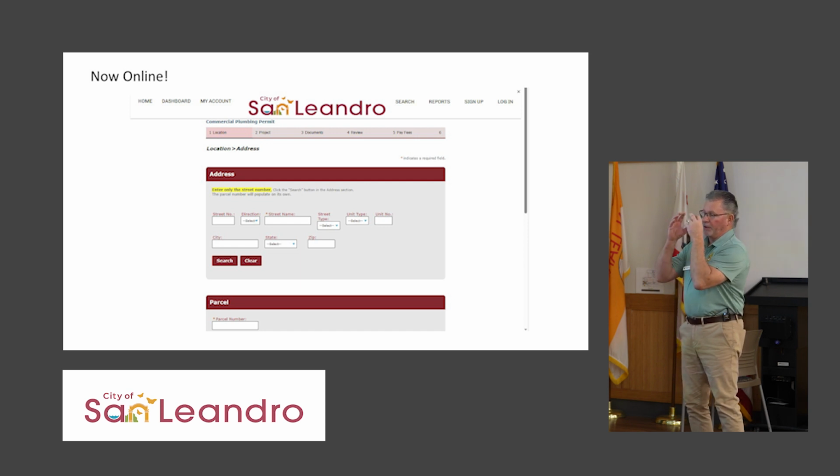We are also central dispatch. We get that submittal, and we look at it, review it. If we have to send it to planning, engineering, transportation, let's say environmental, maybe the fire department, it all goes right out of here to them. Then you put yourself as the primary, and as soon as it gets sent out, you get pinged, it tells you where it's at. And you can look on here to see where it's at in the process. That's typically, for most jobs, within the same day or the next day.